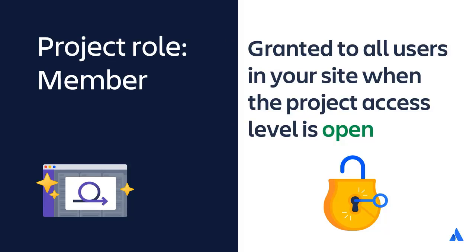It's important to understand the permissions granted to users with the member role. When projects are created and the project access is set to open, all users who log into your site are granted the member role in the project.